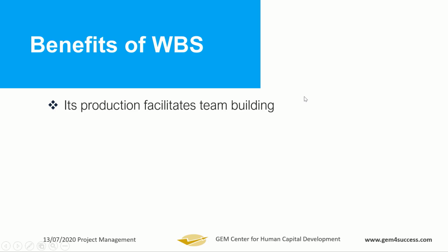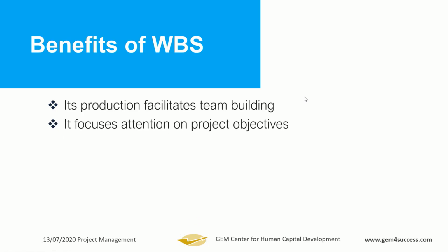It focuses attention on project objectives. Whatever is not in the WBS is not in the scope. Whatever is not in the scope is not in the WBS. It gives you focus. You are starting off from an approved scope, and then you are breaking it down, and then you are breaking it down again. You are breaking down what is clear into other things, and then those ones are broken down. So what it means is, at no point in time are you straying away from the core objective of the project. At no point are you straying away from the contents inside the scope. So it helps focus attention on the project objectives.